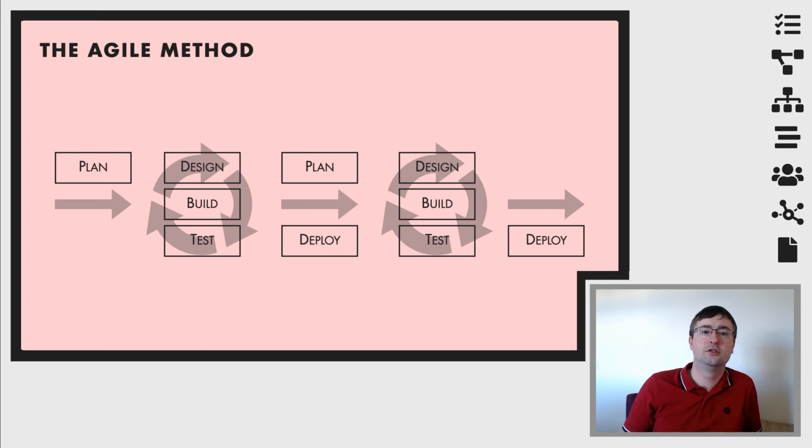Agile is a little bit different. Agile projects are suited more when the scope of the project is expected to evolve and there's really a lack of a clear view about what the final product is going to be or what the expectations of the customer are at the beginning. This is particularly true anytime that a project is undergoing these cycles of rapidly changing requirements.